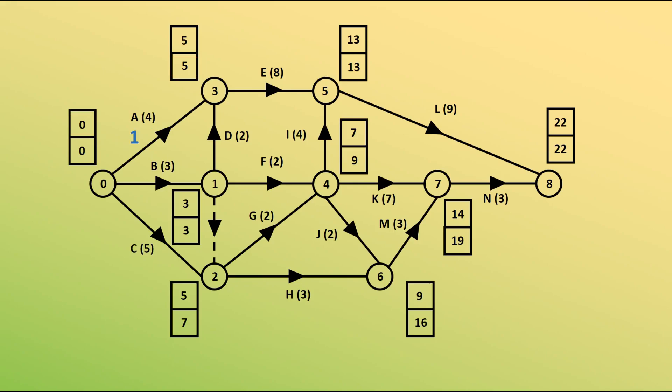For b, 3 take away 0 take away 3 is 0. For c, 7 take away 0 take away 5, float of 2. D, 5 take away 3 take away 2 is 0. E, 13 take away 5 take away 8 is 0.